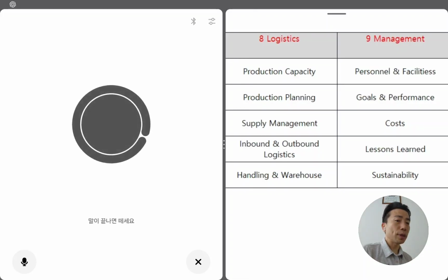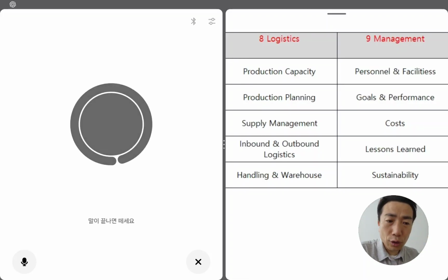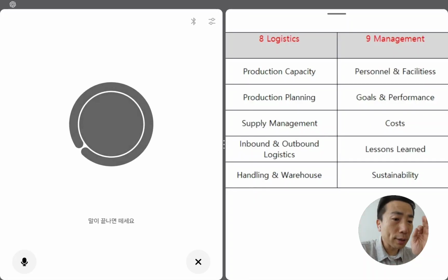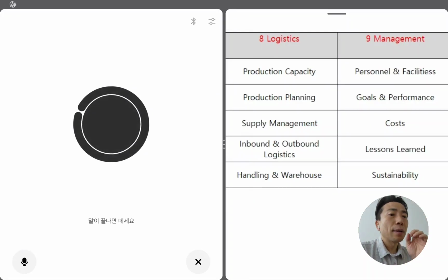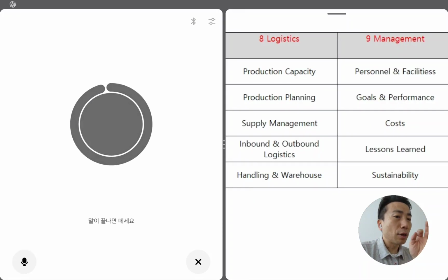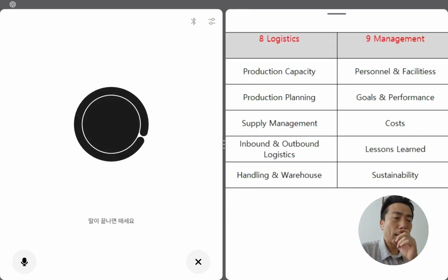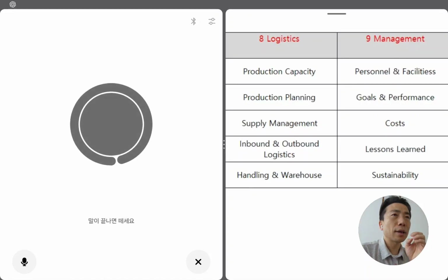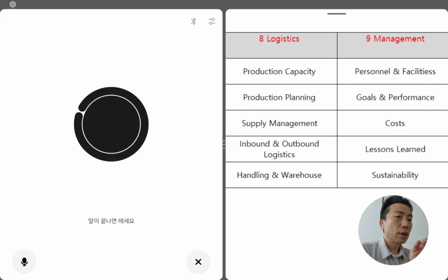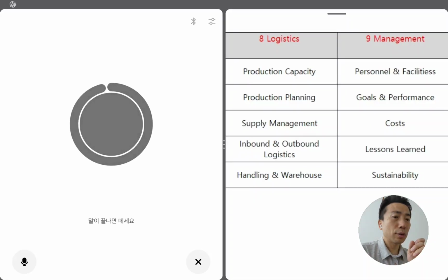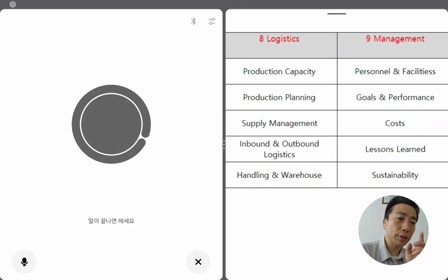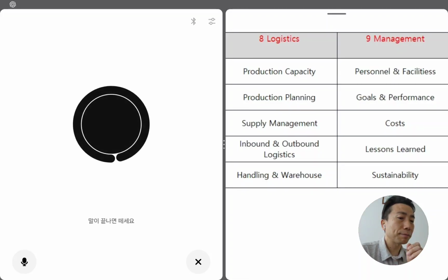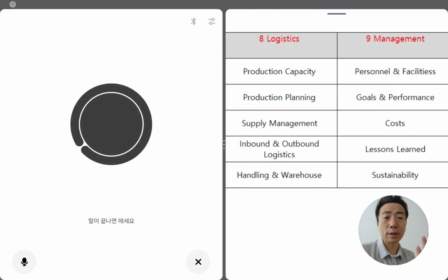I say one more time, there should be an every issue list first. I collect that, and then lesson learned entity members should pick up main issues from there and then document it, report it, and share it. So to meet the customers' high expectations and their continuous improvement.